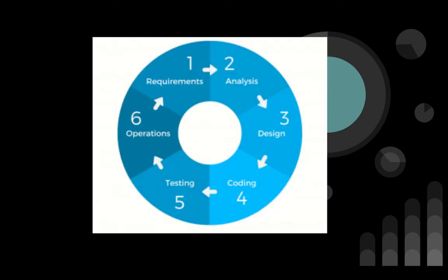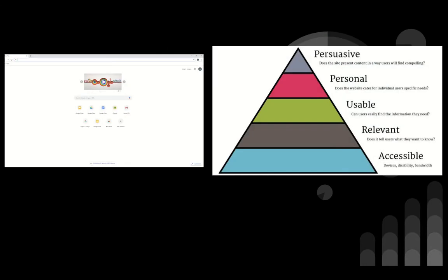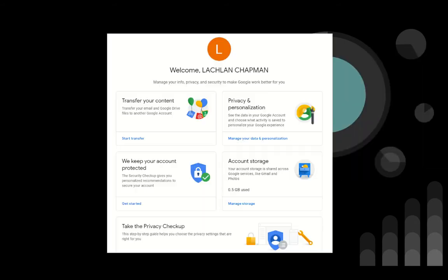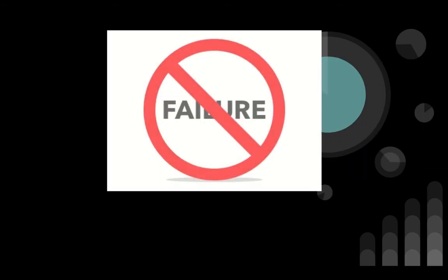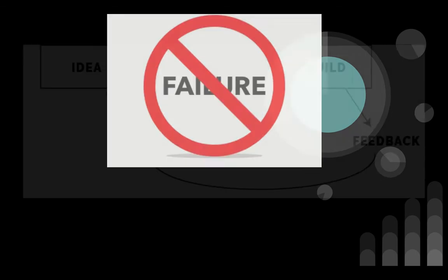Each component of Google Chrome was developed with different approaches. The user interface was developed with an Agile approach. Google ran the program with test users, and they were able to change the UI on the go to suit the users' needs. The accounting component was a huge, complicated system which needed proper planning and proper execution for the multi-billion users using this system. There was no room for failure. They prototyped each revision of some new products such as Docs or Slides, and this allowed for a bug-free release on the final day.